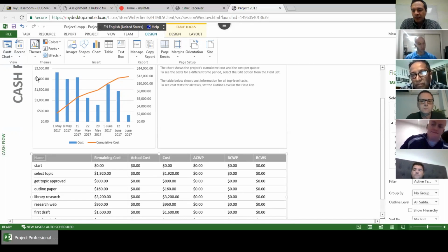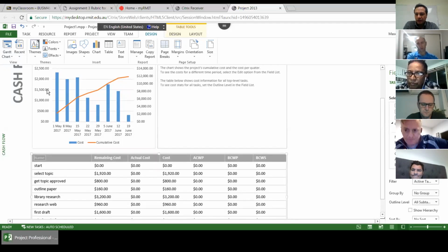Yes. Some activities are not mentioned, but they are naturally included in the project. For example, inspection or follow-up with the suppliers, this kind of stuff, or formally closing the project. These are the activities that you should consider. But some activities have not been mentioned, for example, installation of the desktops. So for you, it would be better to exclude it and put it as an exclusion of the project. Some of you have already discussed it in the exclusions when you were submitting assignment 2.